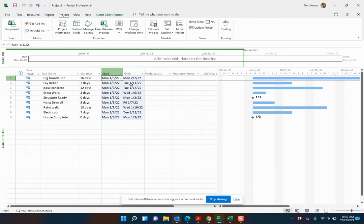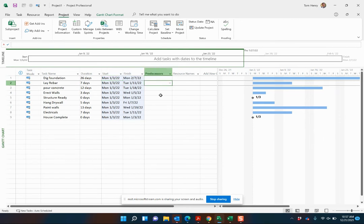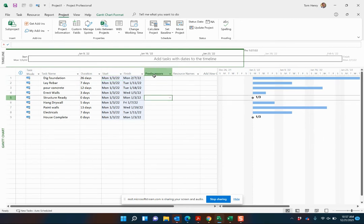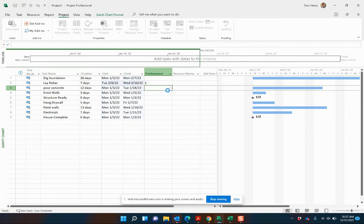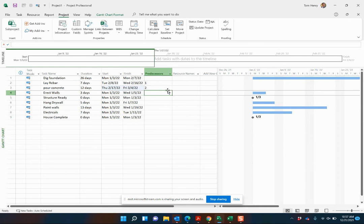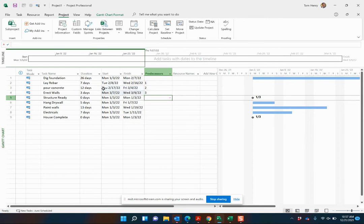Next thing I want to do is look at the predecessors. Now we can do this in a number of ways. We can just type in the number. So obviously we're going to look at line one. Lay rebar happens after dig foundation. Full concrete happens after we've laid the rebar and the walls happens after that.